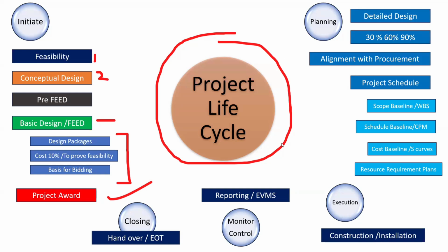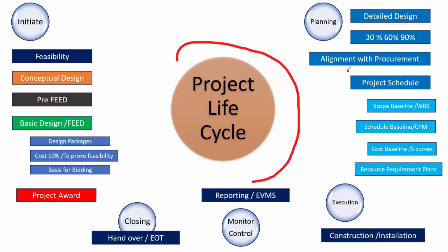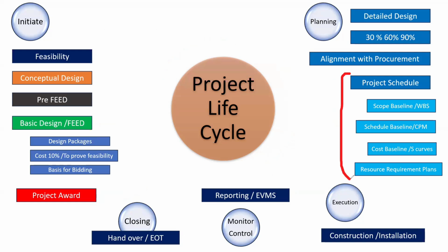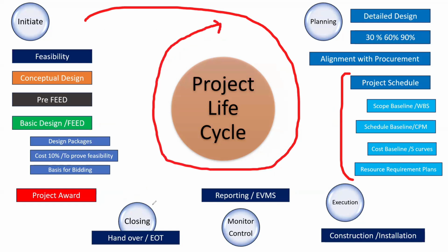Yeah, planning, ये complete planning है. There is a one question, what is the difference between planning and this is complete planning, and this is scheduling. Scheduling is only relating to the prepare this project schedule using Primavera P6, whereas to complete this cycles, which is dealing with the complete cycle, is called project planning. Yes, work